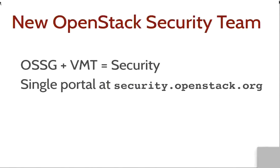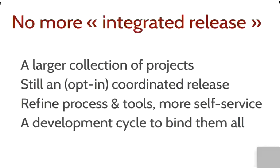The second change is that we no longer have an integrated release per se. We no longer have this closed set of projects that make up the OpenStack product release every six months. We have a larger collection of projects that are all OpenStack projects. They still release at the end of a six-month development cycle. There will still be an OpenStack release at the end of the Liberty cycle that we are currently in, but it's more an opt-in release — projects can be part of this coordinated release at the end of the cycle. It's no longer a closed set that excludes most projects from appearing inside the project deliverables.